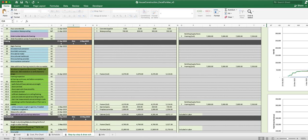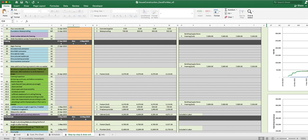You want to measure the cabinets around 22 April. You want to be making cabinet and countertop selections around 17 April. Even though this is all under the framing heading, these are things that need to be happening so that when it's time for the cabinets to be installed, you already talked to the guy, you made the selections, and they've been working on it. Now they're ready to come put it in your house.